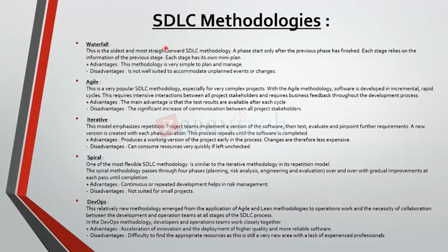So waterfall is the oldest and the most straightforward SDLC methodology. A phase starts only after the previous phase is finished. Each stage relies on the information from the previous stage, and each stage has got its own mini plan. The advantage of waterfall is that this methodology is very simple to plan and manage. The disadvantage is that it is not suited to accommodate unplanned events or changes.